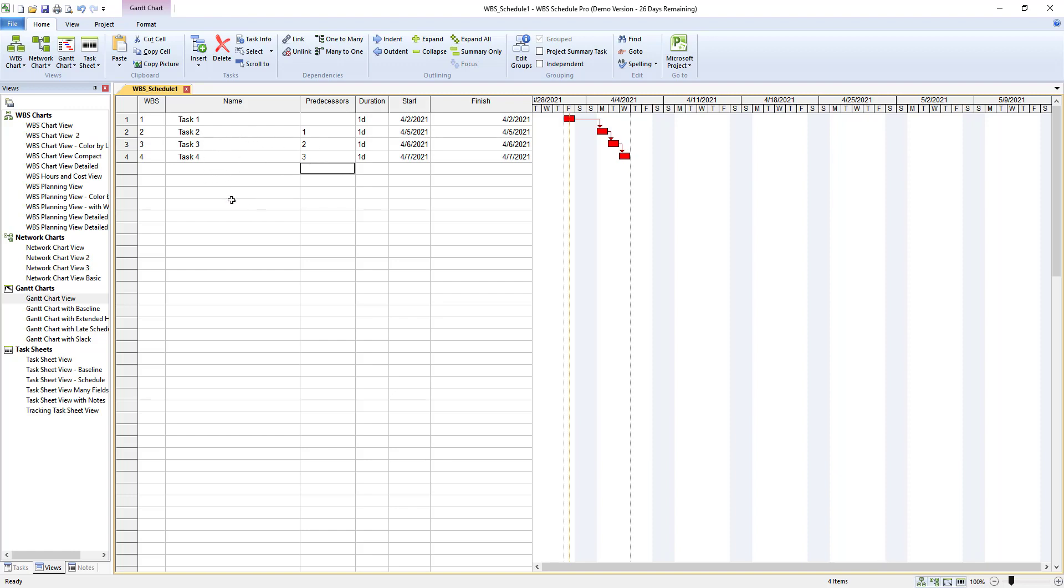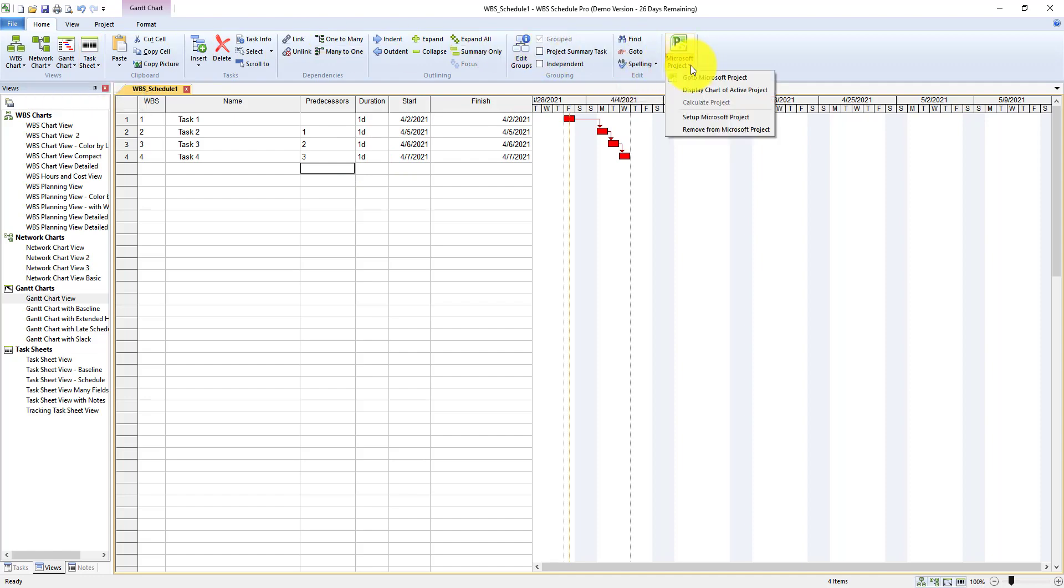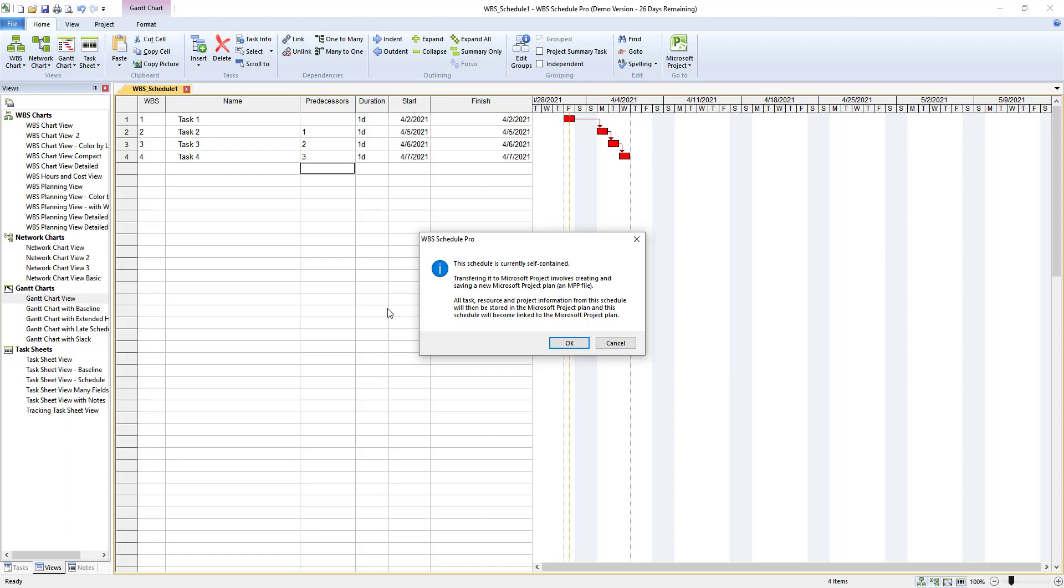Upon creation of your schedule you will then want to export this into the Microsoft Project. To do so you would go up here into the ribbon, choose Microsoft Project and then go to Microsoft Project. I'm going to click go to Microsoft Project. It will prompt you to let you know that the schedule is currently self-contained and that transferring it to Microsoft Project involves creating and saving a new project plan or an MPP file. We're going to go ahead and click OK.